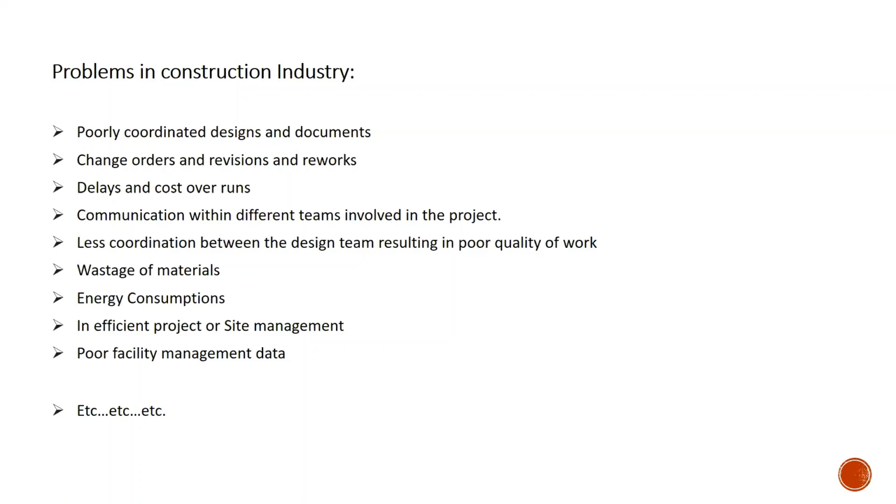And you know that about 30% of the total materials accounted for a project will go to wastage. How is this happening? Maybe because of manual errors in quantity estimation or something like that. We are just calculating the quantities manually, it is not model based. For a large project, errors could be there, and wastage of materials will be there.